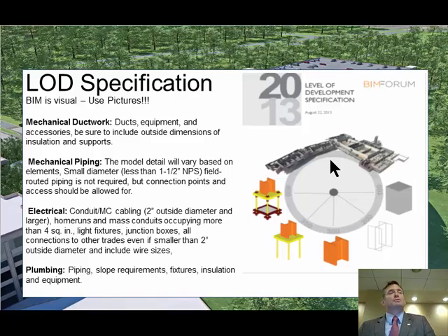So that's what people are doing so often with BIM. They're saying, hey, we're going to use BIM. Here, use this piece of software. And that's all we say. I have literally seen contracts that had a line added almost at the very bottom. There was still some fine print underneath it, the really fine stuff they don't want you to read. But right above that was a line that said, this project will use BIM. It's the same premise. Here, use this soap. There's no definition or spec to it.